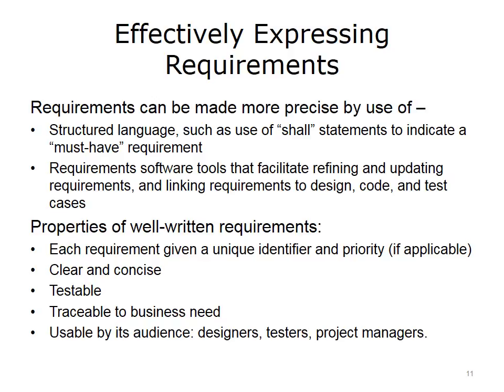This is a word that is only used in a precise way, and the most common example is the word shall. For example, you would reserve the word shall for a case where you have what is called a must-have requirement. If you have a disciplined use of the word shall, it can allow organizations to count the number of occurrences of the word shall as an indicator of the magnitude of the level of requirements on a project.